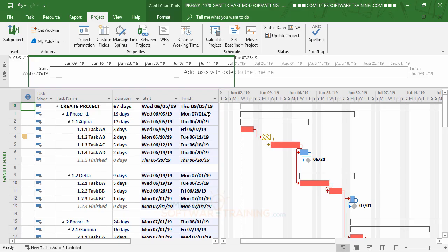So it pushed the start date up and everything rescheduled, right? Well, this time around, we're going to schedule it from where it ends. We're going to say we want it to end on such and such date, and thus it'll pull the project back. And hopefully, it doesn't pull it back beyond today's date.